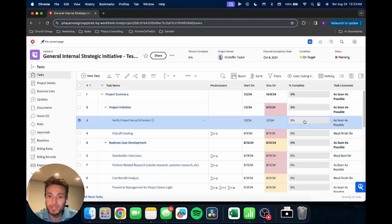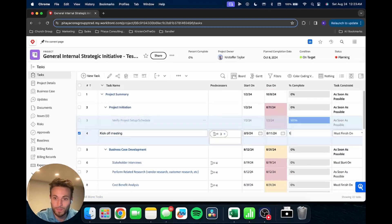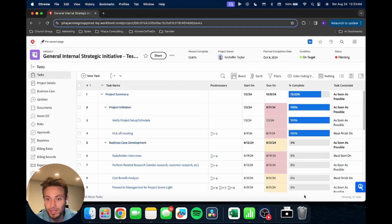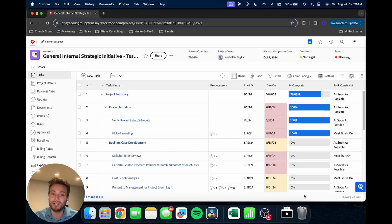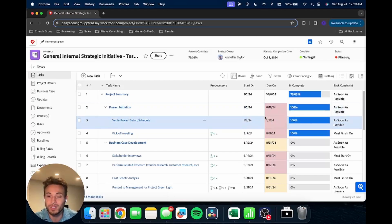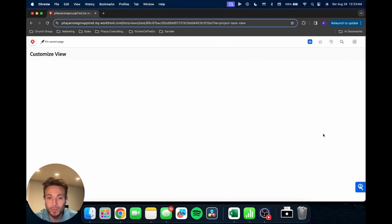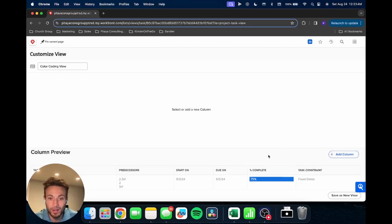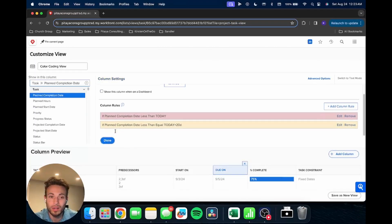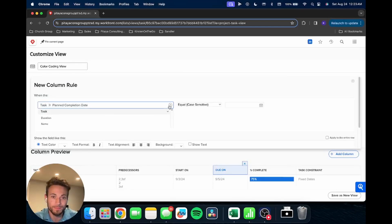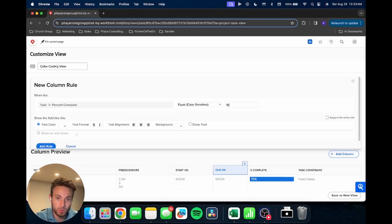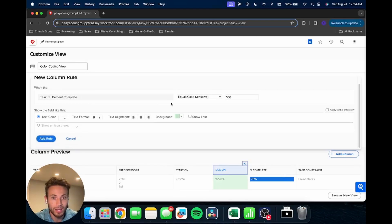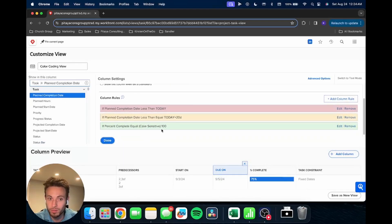But let's imagine now, so we have these rules set up, but let's say we've completed a couple of these tasks. In this scenario, we'd probably be like, hmm, it's not doing what we want it to necessarily because this is a bit misleading. We're seeing it's red. It means it's past due, but it's actually complete. So let's look at a way to fix that. So we'll go back into review, and we're going to add another rule for percent complete. So we're going to say task percent complete is equal to 100, and let's make it green, right? So if it's complete, it should now be a green color, correct?